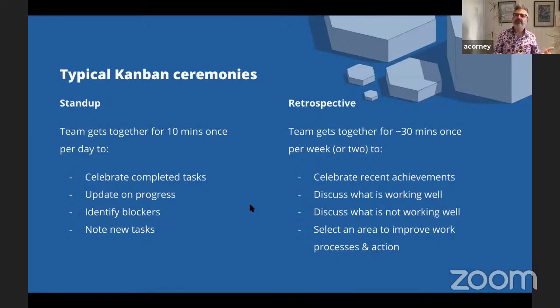So when you do Kanban, there are ceremonies that go with it. And there are two very typical Kanban ceremonies. One is called the team stand-up. So if you're going to do Kanban as a team, then as I showed you, the board has the tasks that all the team is working on prioritized for the team and perhaps assigned to people already or not. In a stand-up, the team gets together 10 minutes at the beginning of the day, and first of all, celebrates the tasks that have been completed.